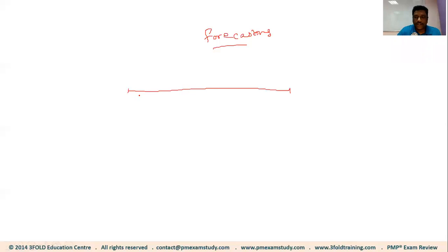This is your S curve, right? Basically, I took an S curve and made it a straight line, which starts from 0 and goes up to $40,000. So this is your BAC. Out of this $40,000 of work, how much work did we complete? How much work you completed is nothing but your earned value, because we completed 200 sides of the compound wall, right?